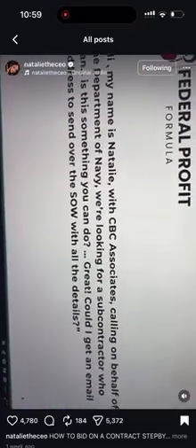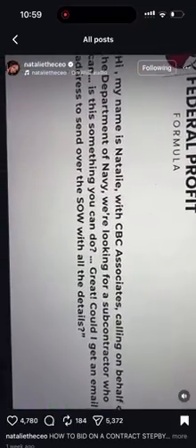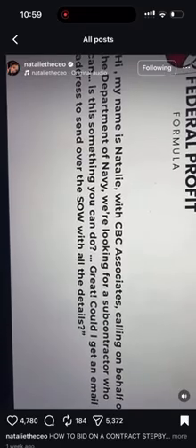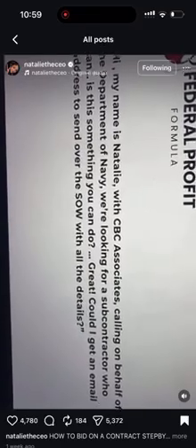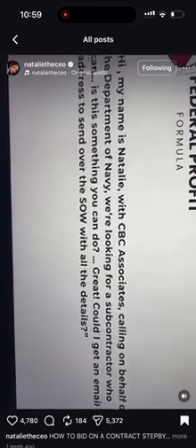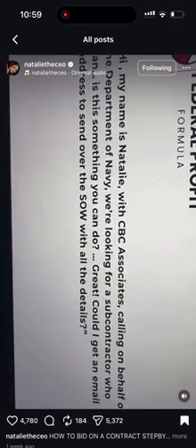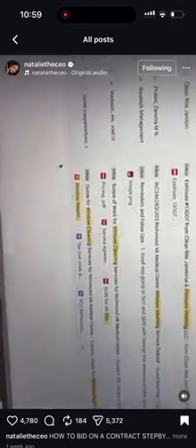When I call my subcontractors, this is what I'm going to say. I'm trying to just get their email. I'm not trying to keep them on the phone for too long. If they start asking me questions, I'm going to direct them to the email, letting them know that the scope of work will have all the details that they need. And if they have additional questions, they can shoot me an email and I'll send that over to the contracting officer. So after I did that, I got a few quotes.